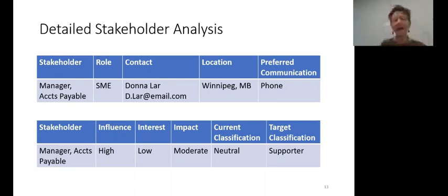I have a stakeholder and I would number these. I seriously would number these because I want to know how many stakeholders I'm dealing with, so this is partly estimating. I want to know the stakeholder, their role on my change, how I'm looking at it, and their contact information. So there's a certain amount where stakeholder identification crosses over into stakeholder register.